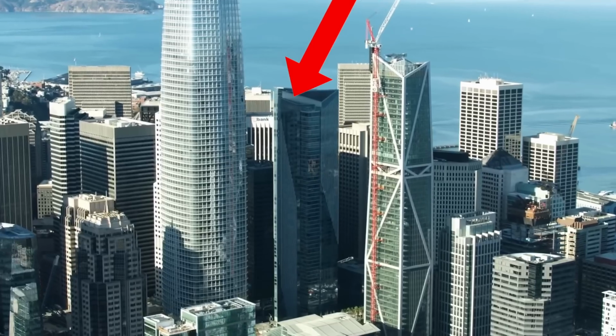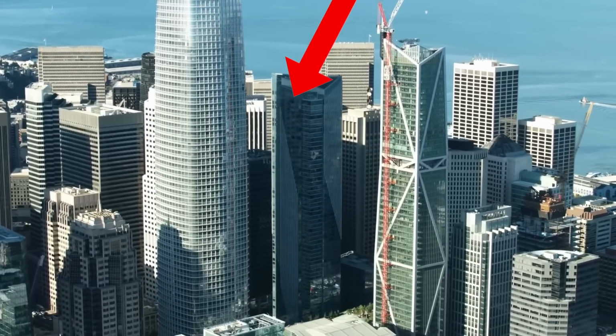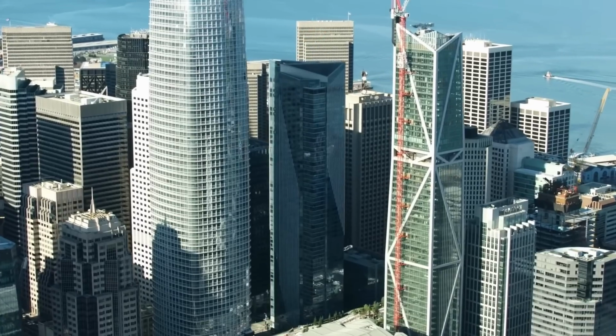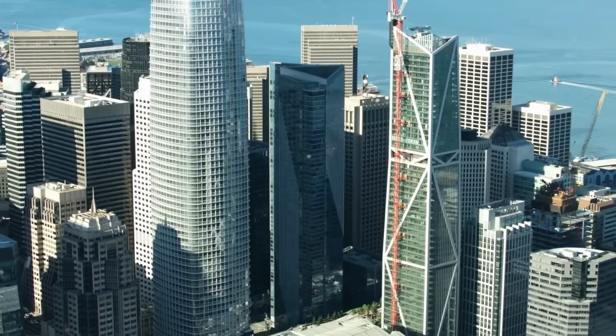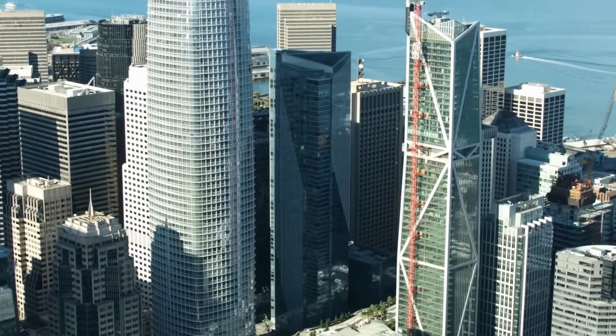Now, again, I was going to go over a couple of highlights here. The Millennium Tower was opened in 2009. Construction began in 2005. Originally, a total settlement of the foundation was expected to be in the range of 4 to 6 inches. And by 2009, it was already nearly 10 inches.